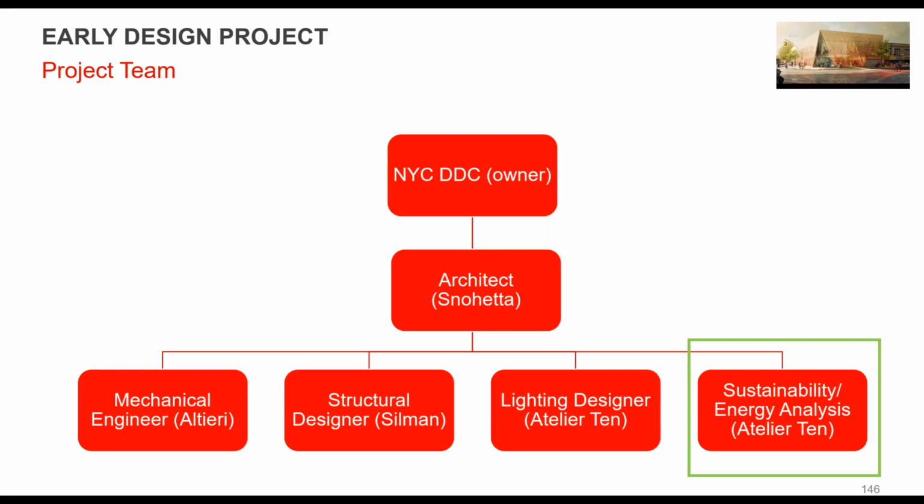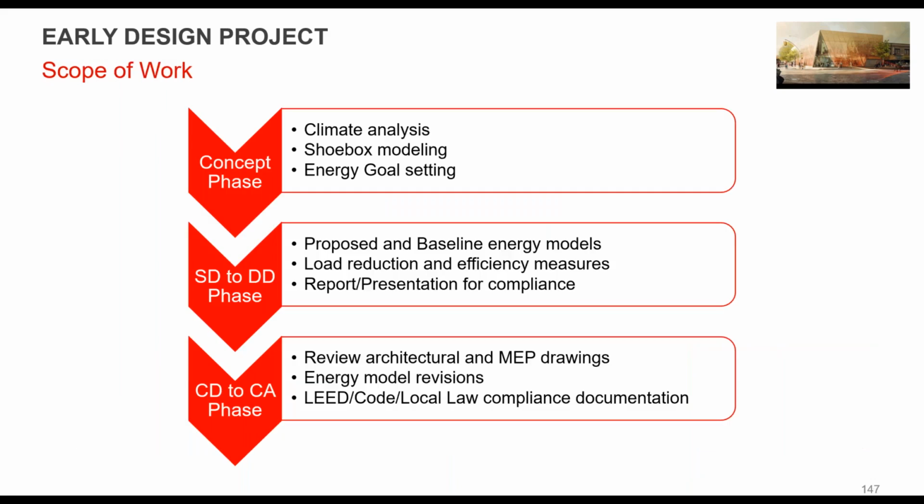So the scope of work for the concept phase: we're going to do a climate analysis, shoebox modeling, and help set the goals for energy. Once we move into schematic and design development, proposed and baseline energy models, looking at how close we're getting to energy goals, looking at load reduction and efficiency measures, and then a report and presentation.